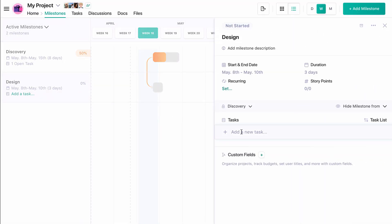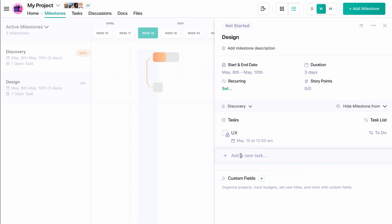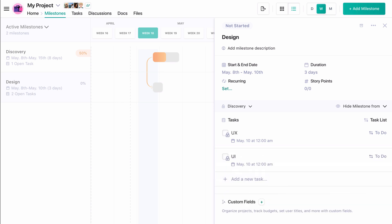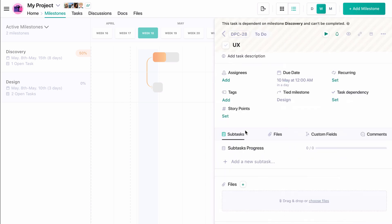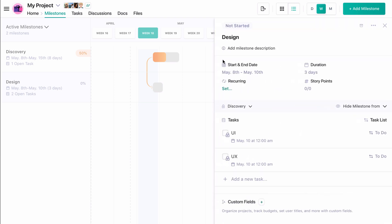And let's give it two tasks, UX and UI. You'll notice that these tasks are locked. We may enter these tasks and edit their information, but we cannot complete these tasks until all of the tasks in the dependent milestone are completed.